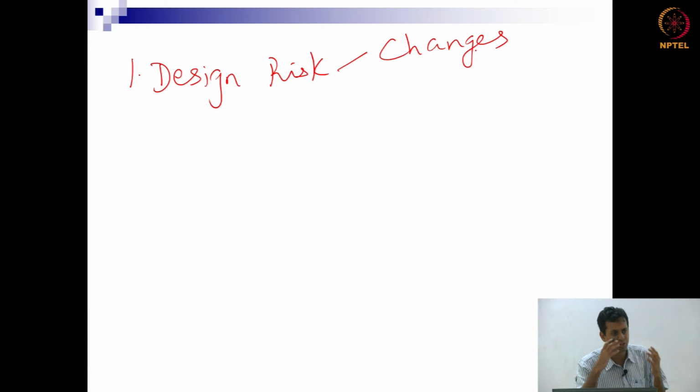And again, we'll talk about solutions later on, but this is where theoretically 3D BIM models and so on can play a role. You can simulate in 3D, you can do walkthroughs, and we can arrive at what the building should look like much ahead of time, rather than having the client see it midway and say, wow, this is what I want, I want this change, okay? So that's one category of risk.